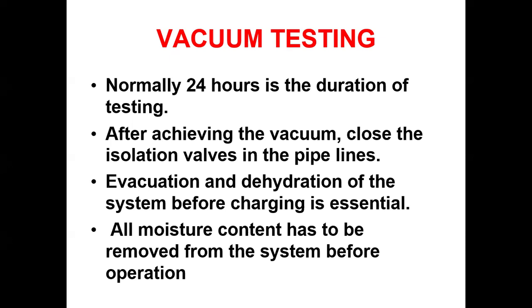Okay, now. Basically here, we will be removing the entire moisture content from the pipe system itself. How is it removed, sir? Is any equipment used? Yeah, we have a blower or some kind of pump. It's kind of a blower. So these blowers should be set, and you will have some kind of meter readings, like a pressure gauge or something. So until the pressure gauge reaches zero, you need to wait. Okay, now.